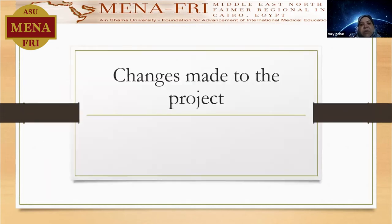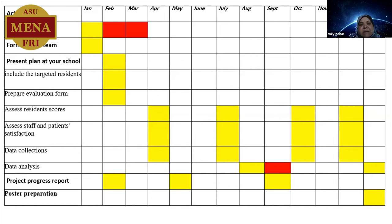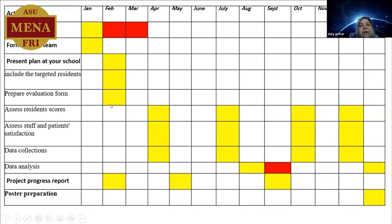Changes made to my project: I didn't make major changes. The IBP approval was delayed because of paperwork and data analysis issues. The project team was formed, I did a workshop, I met the residents and the trainers, I formed the team, I prepared the evaluation form, and I completed the first evaluation including the specific baseline evaluation of the residents.